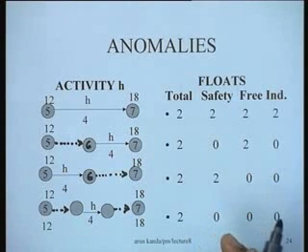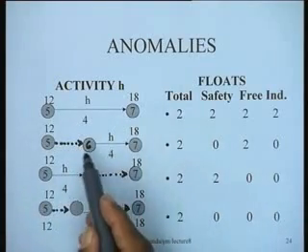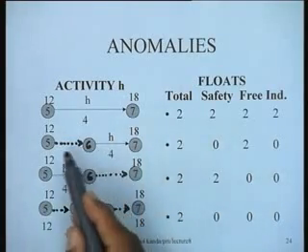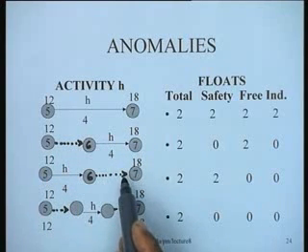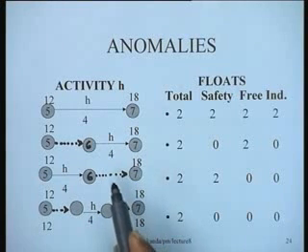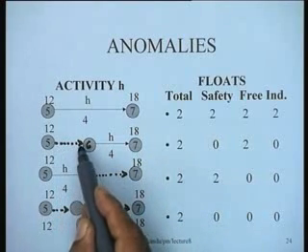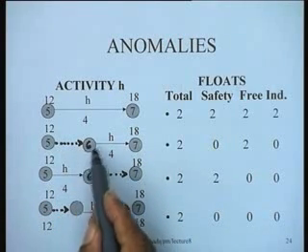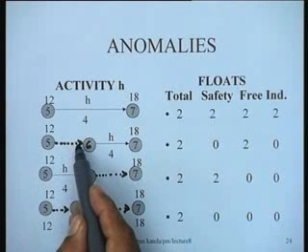Now this is an anomaly really, because it's only one activity and the dummy is really placed there, and it doesn't really matter whether you place the dummy here or whether you place the dummy here. But you see from this example that it does matter where you place the dummy, and the interpretation could be that this dummy is equivalent to an activity which is actually constraining this activity. How? Because this could be like an approval activity which takes 0 time.